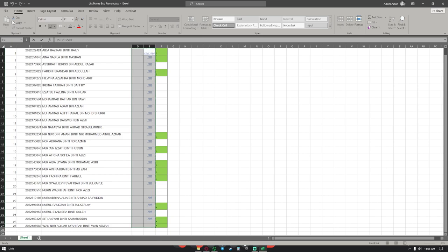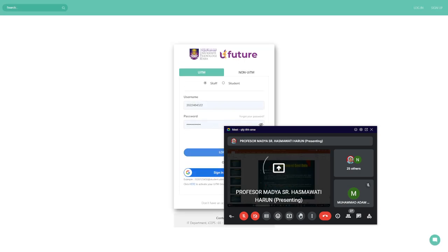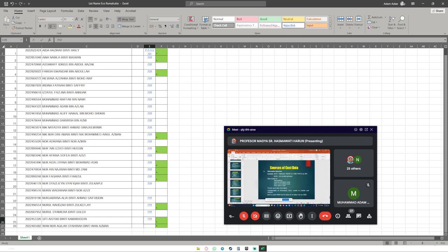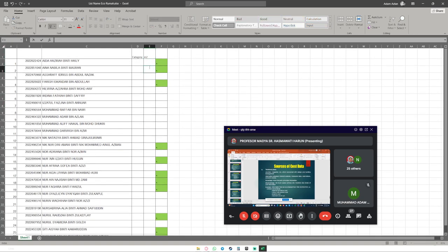Some recaps, I will recap just in case some of you are still wondering what happened, or you don't remember, it was just last week. So what we did last week is we looked at several sources of cost data. We see that sources of data are available in so many forms, technical press, and each has its own advantages and disadvantages. We said that if we document all the prices and bind them in a document, we start in January, finish binding in June, and want to send the publication in July, by the time it reaches the public users, it's already December. So 11 months have passed from the date we collected the data. What that means is, even cost data that you say is current when you collected it is no longer current by the time it reaches the users.